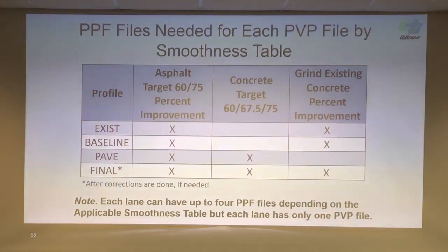So we don't have the profile after they pave, which they are not required to submit. Are they required in the old specs to submit that profile? No, I think in that spec they were not required. It was 2 years ago. So to analyze the claim, they wanted to see the percent improvement after they pave.